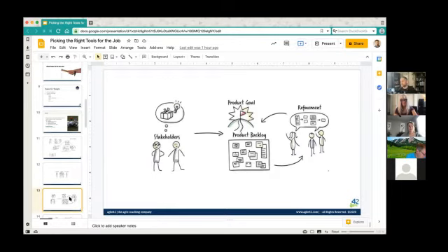You're also committing to some collaboration with stakeholders. The whole idea in Scrum is you have this product goal. Product backlogs are items of work that would get done to meet that product goal. And the Scrum team and stakeholders collaborate with each other continuously to keep refining that as you go. The goal there being you're constantly learning. You're showing the stakeholders something and learning more about their needs. They're learning more about their needs too as the product evolves.